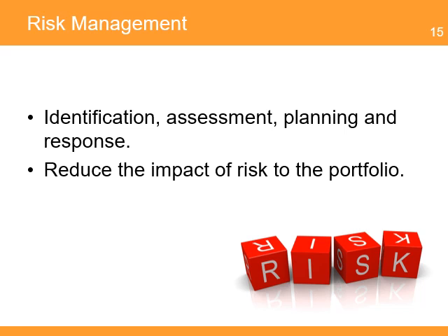In this domain, the portfolio manager will be involved in the identification, assessment, planning, and response, including the continuous monitoring of portfolio risk. The portfolio manager will monitor the levels of probability and impact of the portfolio and recommend actions to respond to risk events and decrease the impact on the portfolio. Actions include balancing the portfolio, increasing supervision of projects, and changes in the portfolio components.